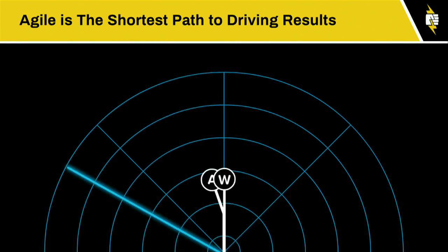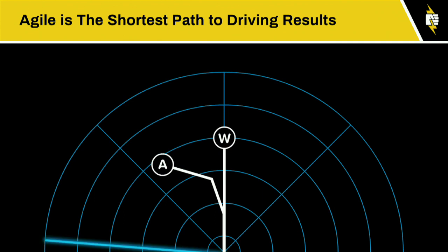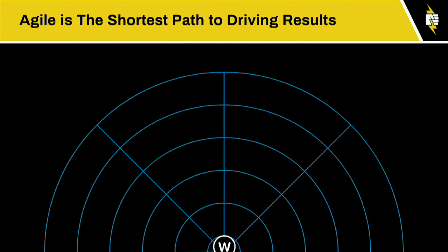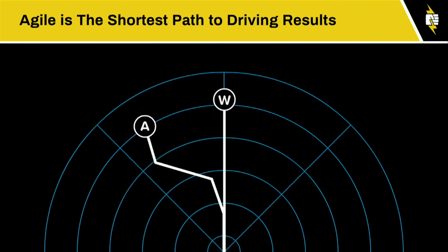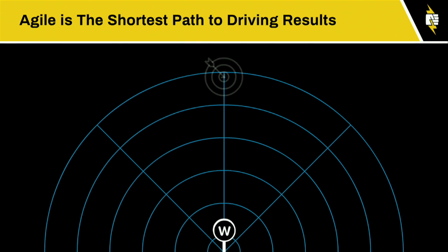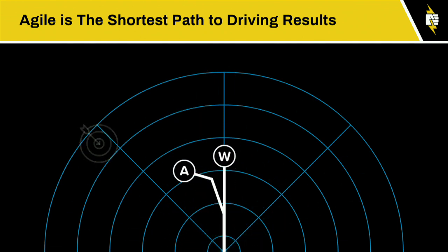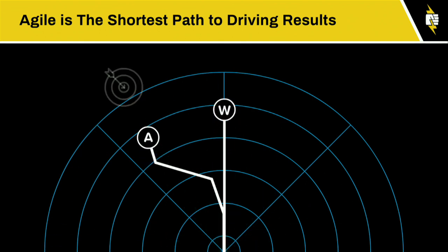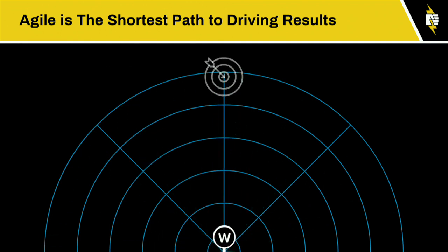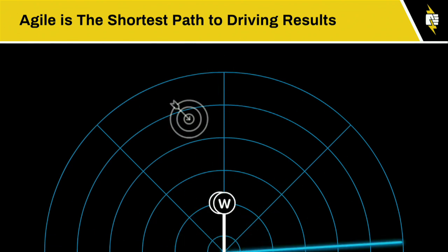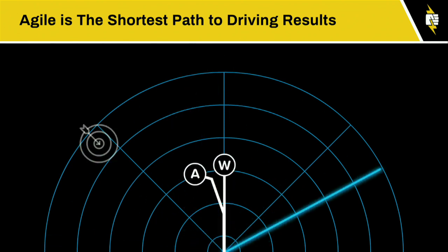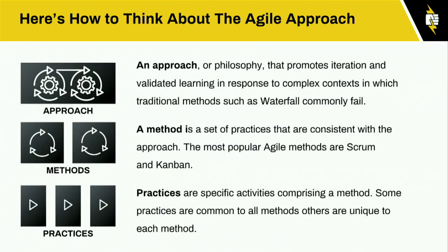Agile is a very different process. The team isn't working in serial mode. It's working in parallel. So you've got your designer, your developer, your tester, and so on, working together on a teeny version or a minimum viable product of what you're trying to build, a site, a landing page, what have you. And they put that little thing in the market. They get feedback on what works or what doesn't, and they pivot and iterate towards the thing that actually solves the problem or gets results for you. That's the Agile process in a nutshell, and it really is the shortest path to what works.